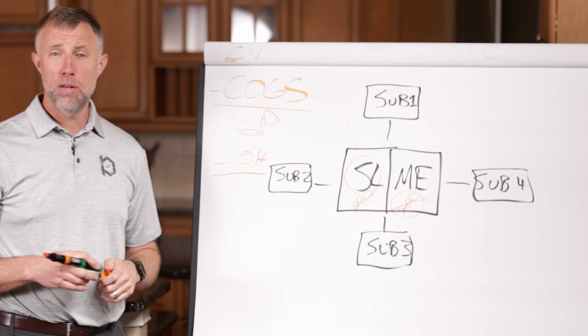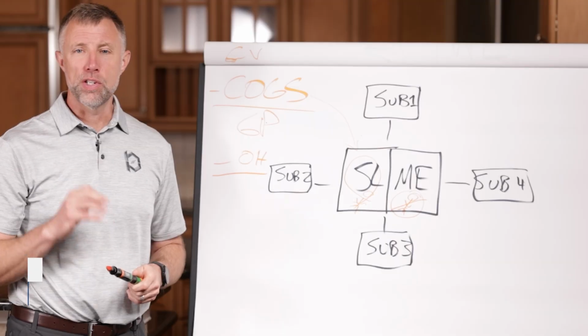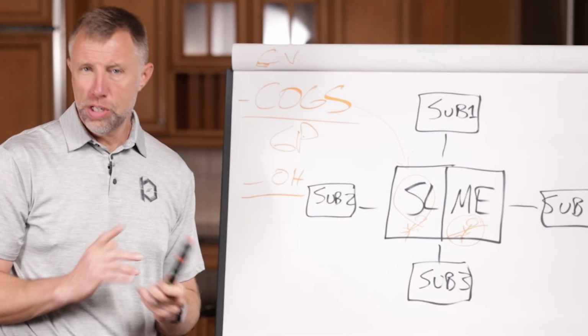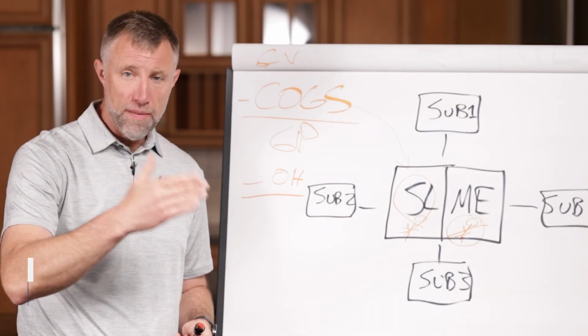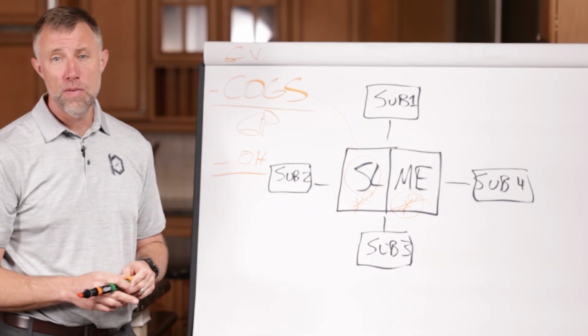track. First thing that you need to be aware of, every single year, or at least twice a year, you ought to have a subcontractor training day in your construction business. What does that mean? Bring all your subs in that you work with. Make it mandatory. Hey, as a condition of working for us, you have to complete 2 training days and we only offer 2 in the year. And so these are the days that you've got to be able to come.